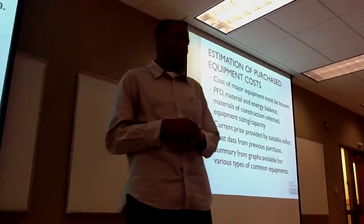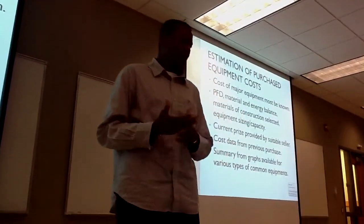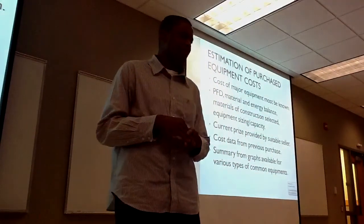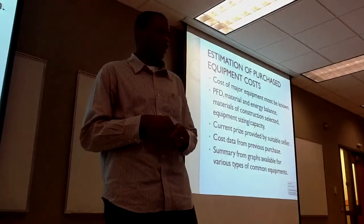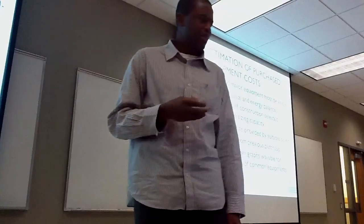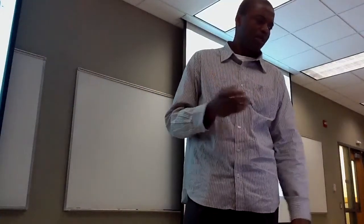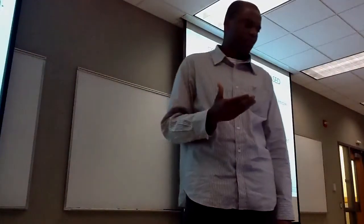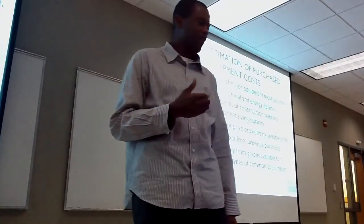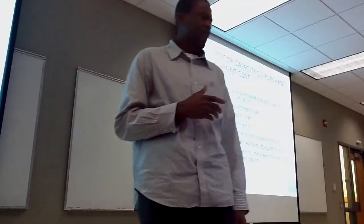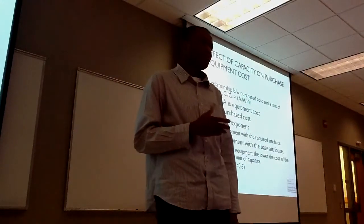For estimation of purchased equipment cost, the cost of major equipment must be known. This involves the PFD, the material and energy balance of construction. The materials of construction are selected and equipment is sized through capacity. Current prices are provided by suitable sellers and cost data from previous purchases, as well as from graphs available for various types of common equipment.